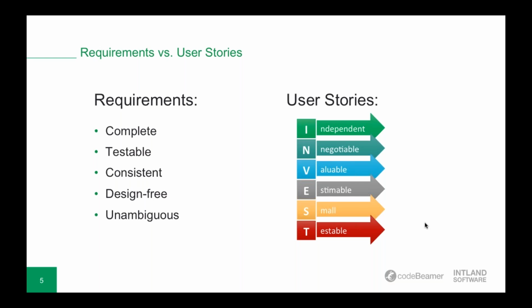Okay, so acceptance criteria are criteria used to determine whether the user story has met the goal or need of the user. But it's important to keep in mind here that involving testers, or at least communicating decisions made by the product owner or customer, is a good idea so the user stories don't lack completeness. All right. Most people argue that user stories by themselves replace the purpose of functional requirements, while well-defined acceptance criteria can take the role of non-functional requirements, making the user stories complete. So that's the relationship between user stories and requirements.